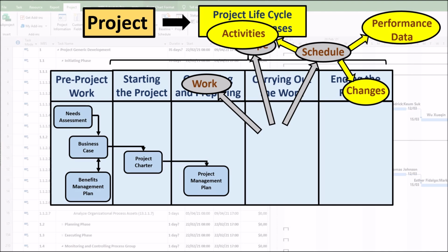Schedule variance analysis, as well as reviews of progress reports, performance measure results, and modifications to the project scope or schedule, may result in requests for changes to the schedule baseline, scope baseline, and/or other components of the project management plan. This ongoing schedule control is important so that the project team can respond to any issues that arise during